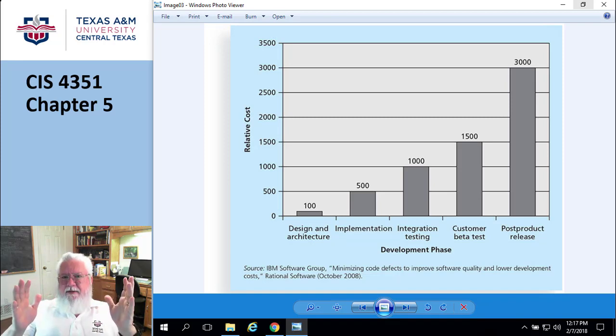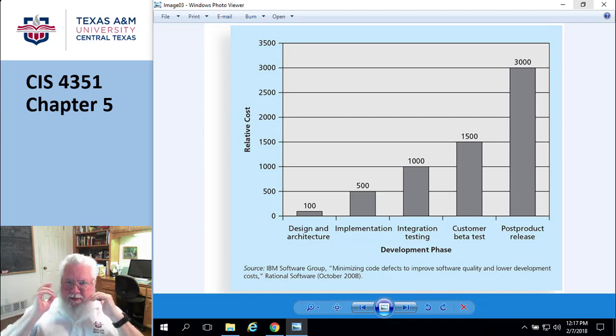So direct observation is typically okay, but you have to kind of temper it with, okay, it took them 5 minutes to do this task, but that's because I was watching. Maybe if I wasn't watching, it's going to take them 7-8 minutes to do that task. Okay, just telling you, this is real life.